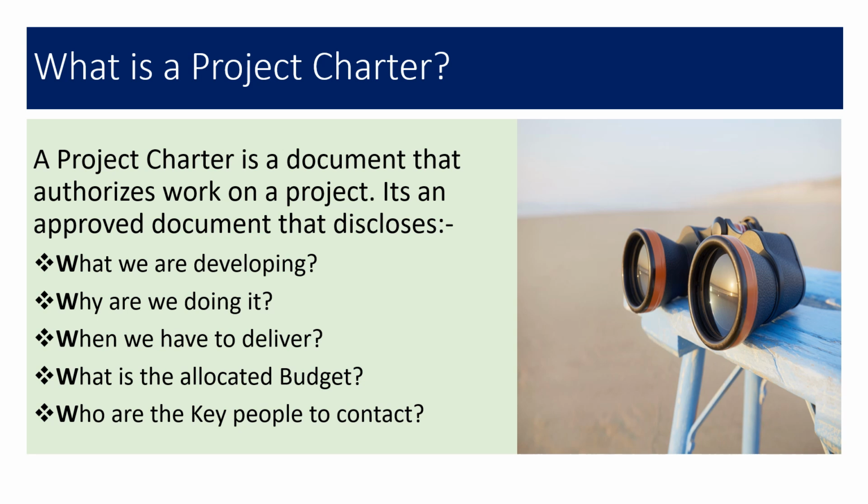A project charter basically answers some questions. What exactly are we developing or implementing? Why are we doing it? What kind of objectives or values will this project provide? When do we have to deliver? What are the key milestones and timelines? What is the allocated budget for this project? Who are the key people to contact, including the stakeholders? Who is going to play the role of project manager? So in a way, this is the very initial document, approved by the customer, which answers all these questions and initiates the project implementation.